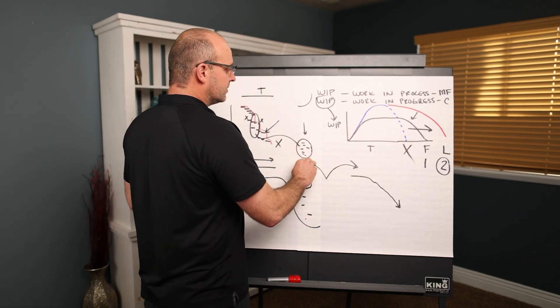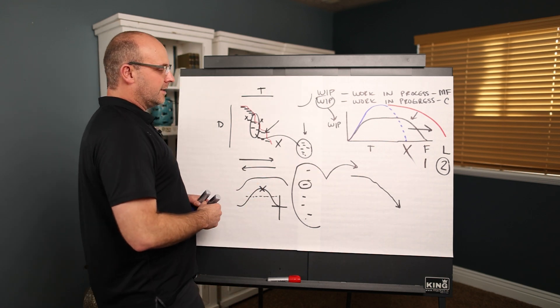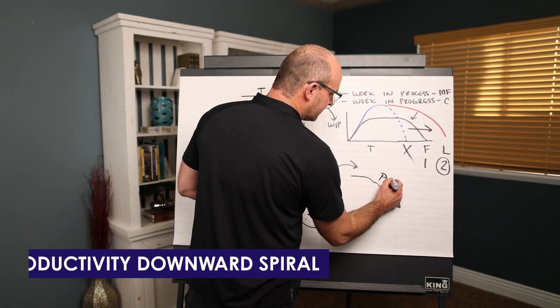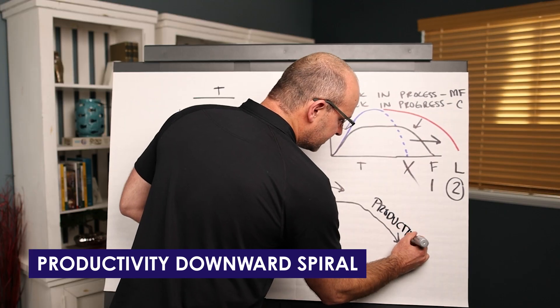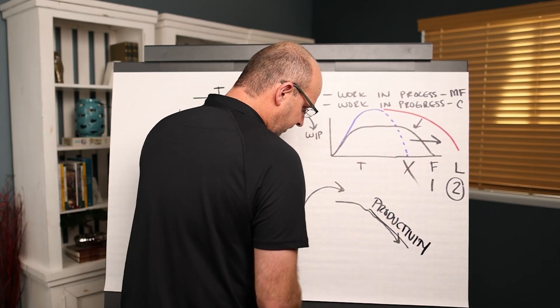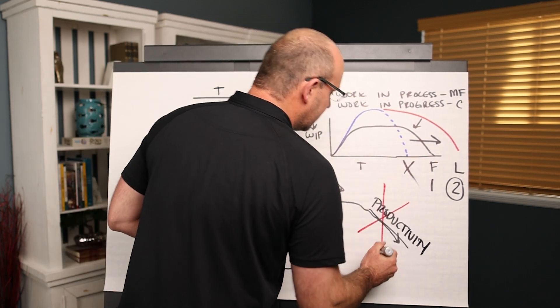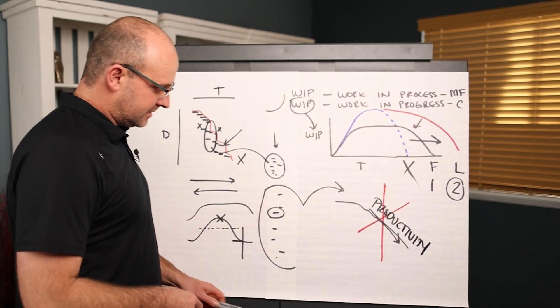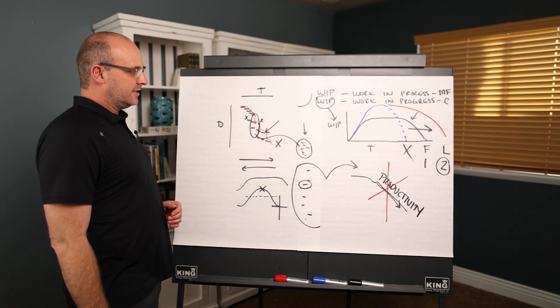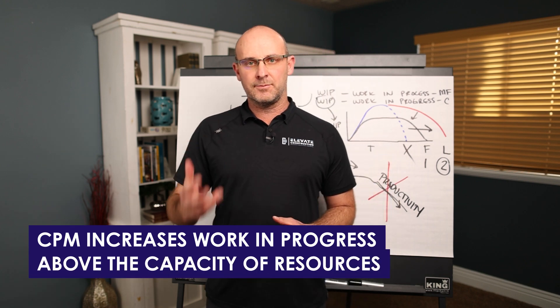And the other thing is it always ends up with trade stacking and trade burdening and hurting people. And the worst part about it is even if you didn't care about people, you enter into a downward productivity spiral. And it's really bad. And you're never going to recover from it. And this is the reason that every single construction project in our industry using CPM has problems and why we're on the decline from a productivity standpoint. CPM increases work in progress above the capacity of resources.